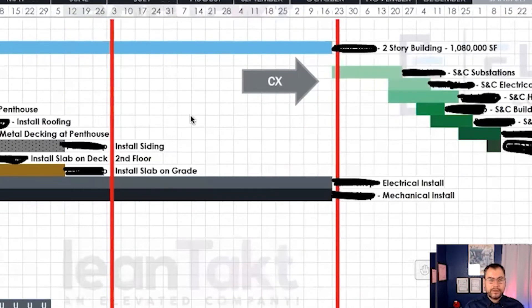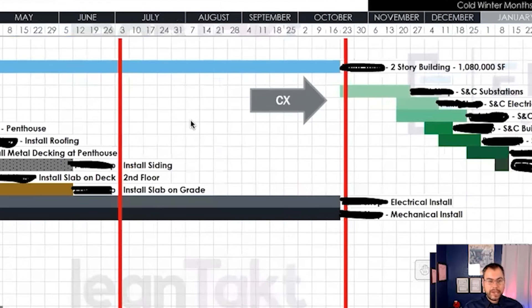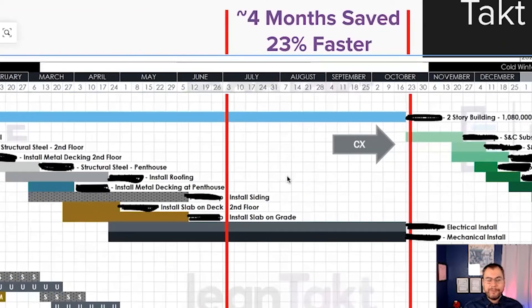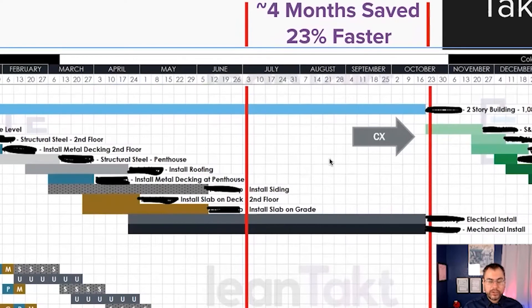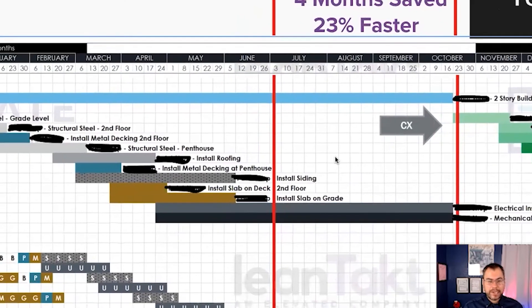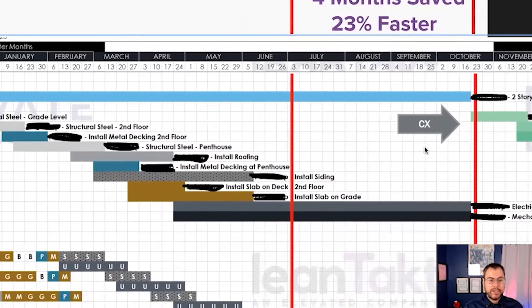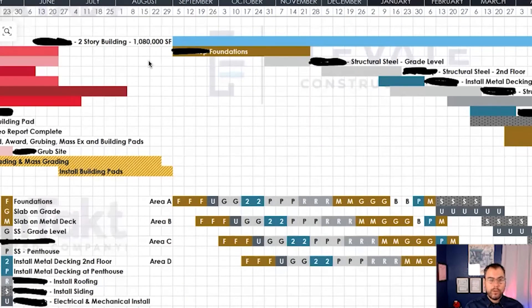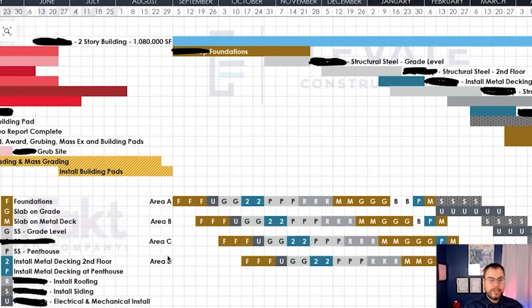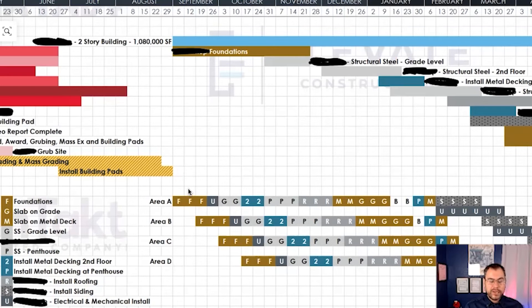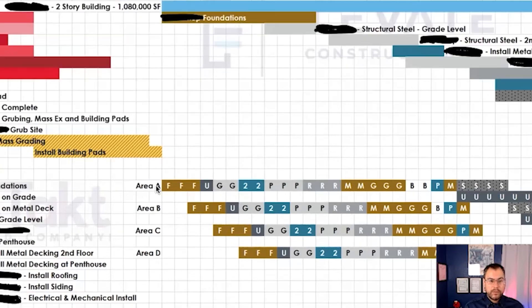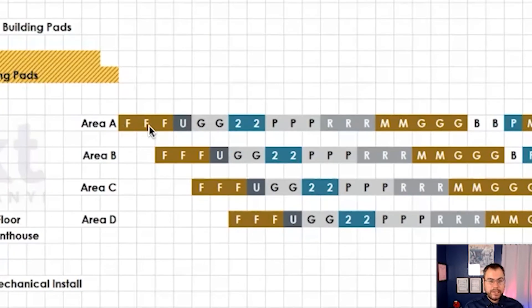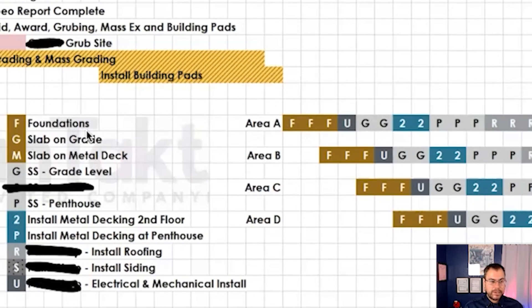Now using the concepts of TACT, like you saw in the simple example above, within 15 minutes with the trade contractors and the superintendent, could we break this 1 million square foot building into four areas? And we just call them area A, B, C, and D. And they said, yes, we can. And so by doing that and using known production rates that this was built on when the schedule was first created, we broke it up into these areas.